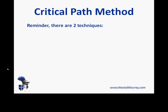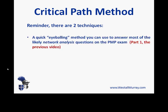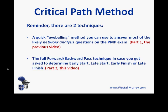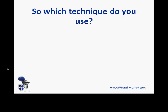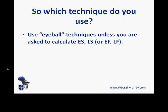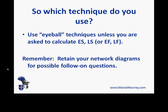As a reminder, there are two techniques. The first video looked at the quick eyeballing method, which will allow you to answer probably 90% or so of the likely questions on network analysis. This video looked at the forward and backward pass technique in case you need to identify early start, late start, early finish, or late finish. Use the eyeballing technique unless you're actually asked about early or late start or finish. When you've built a network diagram, retain it in case you need to use it again for follow-on questions — don't throw away your scrap paper.